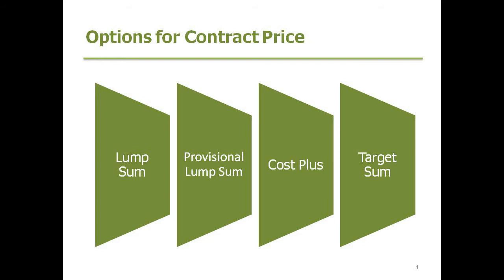You really need to engage a quantity surveyor or a cost engineer to help audit the costs that are coming in throughout the project. Another issue with cost plus projects is how to vary the work. If there's a variation to the project, it's actually quite hard to measure that against what was originally agreed, because there usually isn't one.